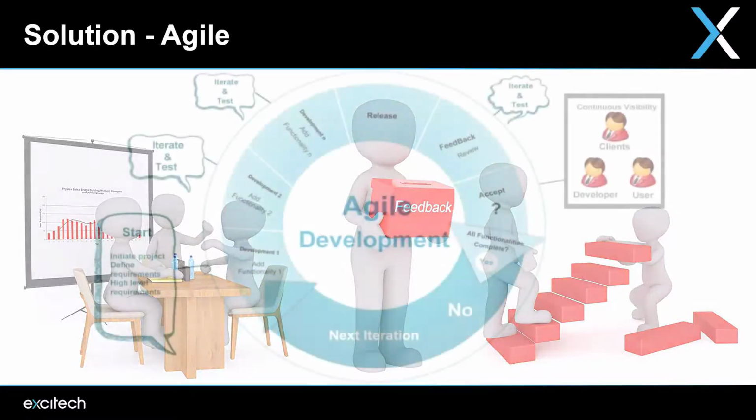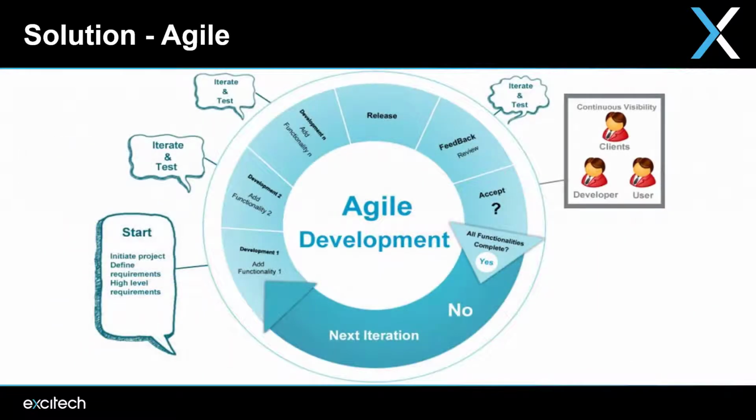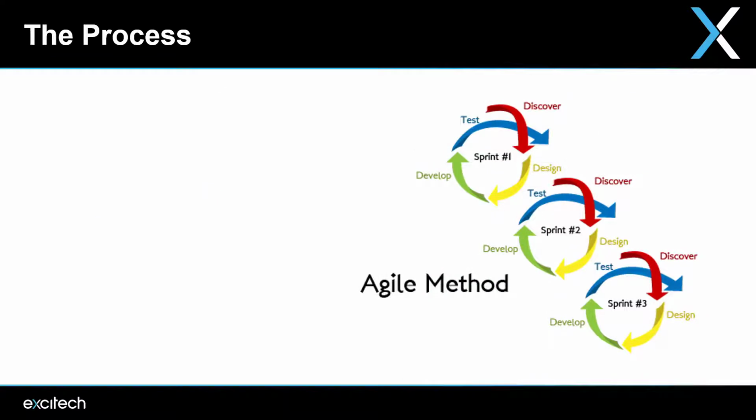Agile takes a fixed time cycle approach to each iteration, identifying task priorities for each cycle, developing and testing each task in the cycle until the iteration time limit is reached, getting feedback on the task completed and building the feedback into the next development cycle where again priorities are identified for tasks to carry out. This cycle can continue until all necessary requirements are completed. In Agile, each iteration will follow a process of discovery, design, implementation and test and taking on feedback before moving to the next iteration.